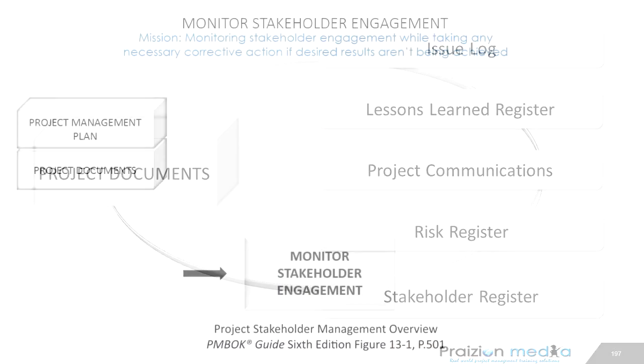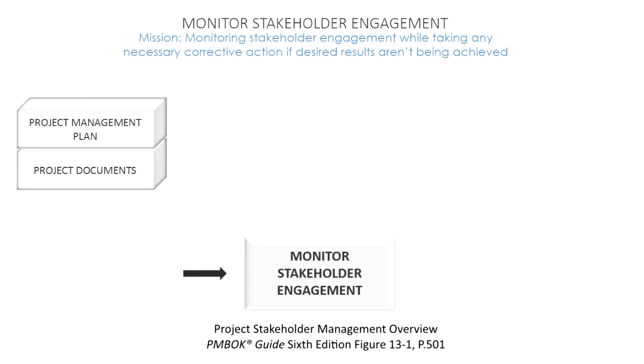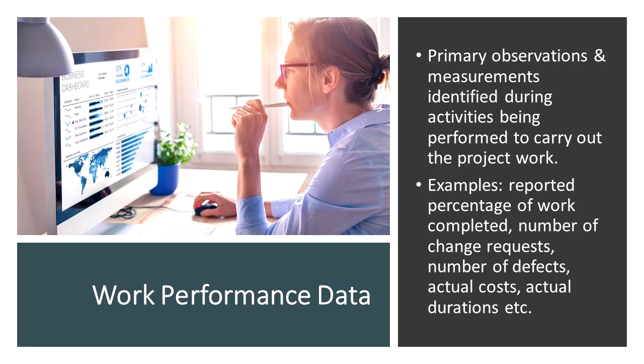Okay? Our next input is a regular one that appears throughout monitoring and controlling, outside of integration, of course. Let's hear it from you. Which input do you see in every monitoring and controlling process outside of those in integration? Let's have it. This is a collection time, folks. It's work performance data. We always have that as an input to processes in monitoring and controlling outside of integration. WPD, we should know that by now, okay? So work performance data is our next input.